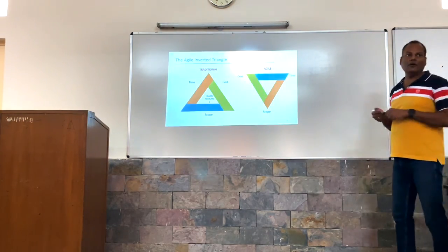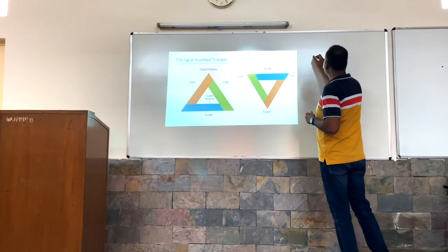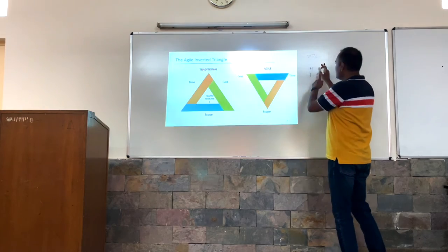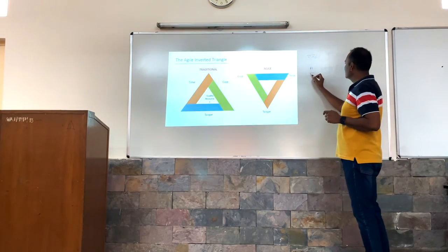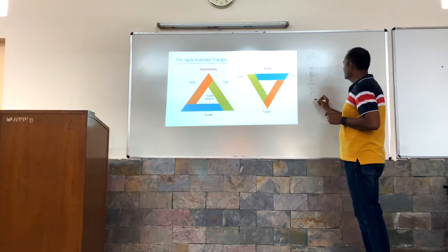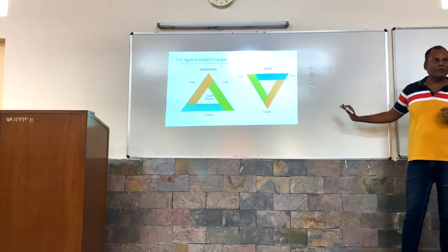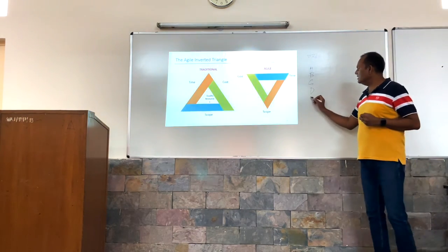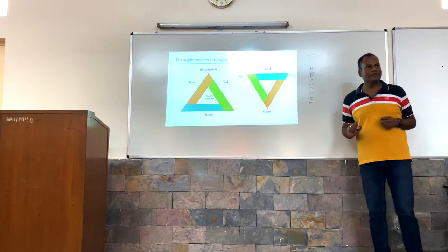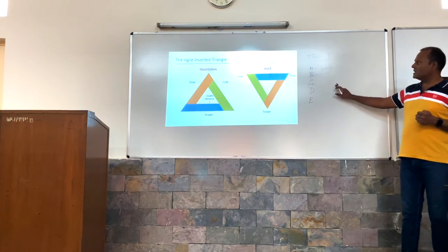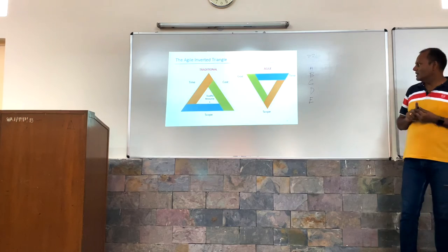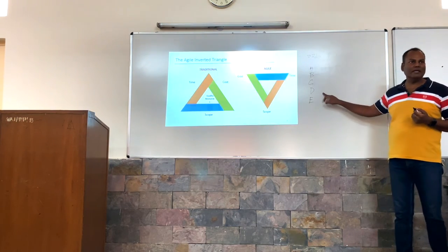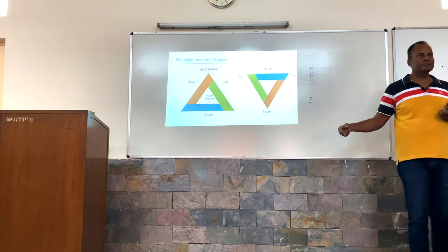Let's suppose this is my product backlog. Sorry, my handwriting is not very good. This is my work A, B, C, D. This is my product backlog. My customer came and said, okay, I need E also. Then I will ask my product owner, if I am going to do E, then I need to remove one from here. Tell me what is your priority.